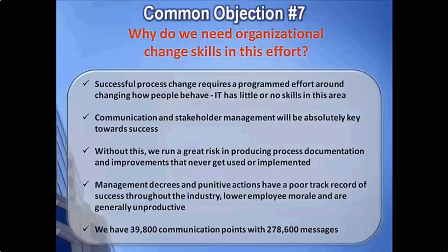I have seen typically some senior executives that will say, I don't think we need to do organizational change. I'm just going to fire somebody if they don't follow the rules. My observation, and I've seen that put into place a couple of times, is that it lasts only about 5 or 6 weeks. At that point, the rest of the IT staff starts to revolt because that action creates more resistance than anything else.